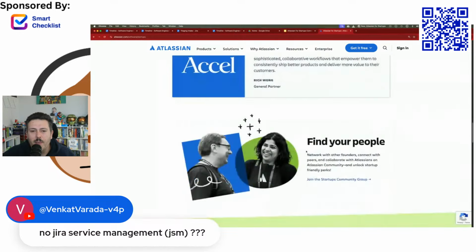Okay. If I were to close my sprint right now, and I'm actually going to do it for you, only one item got done. Even though I have a couple of items in progress and a few in to do, only one actually got done. And Jira's going to say, do you want to move it to the next sprint or do you want to move it to the top of the backlog? Most of the time you roll it over and move it to the next sprint, but this is bad behavior because now you end up with leftover carryover from the previous sprint. Not a good behavior to be in. So you want to push your team and be on top of your team to make sure that as much work as humanly possible is moved from the left to the right.